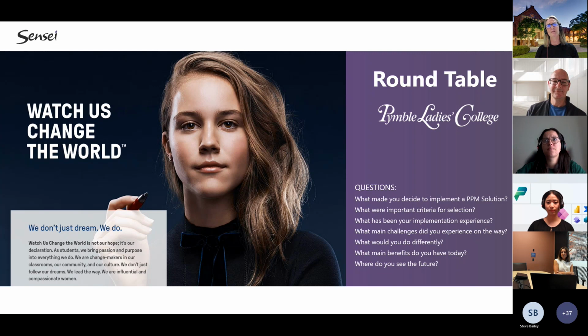I think the other challenge we have had is that we have rolled this out and deployed this into our environment bottom up. So we've brought stakeholders along for the ride. We've had a major sponsor, but if I was to do an implementation process again, I would want to look at top down, where we engage the senior stakeholders all at once and actually make a decision as a business to say, this is the way we're going to move ahead and this is the way we're going to do things. With that could have come a whole change management plan and a whole communications plan, which I think would have made some of the journey a little bit easier.